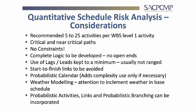Very importantly: never link the same activity to two separate risks. Even if two risks in the register can affect the same activity, never link both. What happens is it compounds them — it's not accurate. It runs the first risk's impact, then the second risk's impact sequentially, effectively double-dipping. Rather take the second risk and link it to other applicable activities for a more accurate analysis.